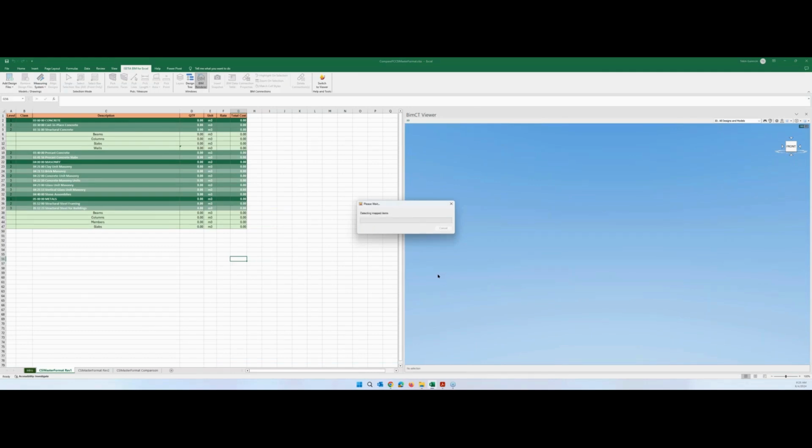At the moment, I am loading the IFC file in ISETIA BIM for Excel with all the parameters, but please focus here. After loading the 3D file, this BOQ will be automatically created in the format which I have used as the ISETIA CSI international format BOQ, like concrete, cast-in-place concrete, structural concrete, precast concrete.